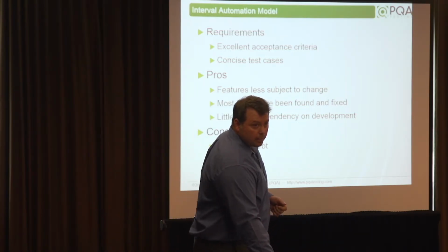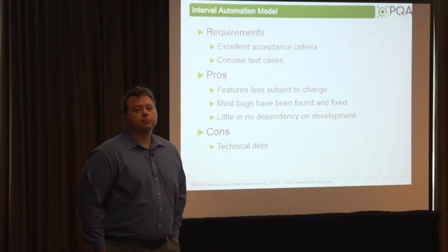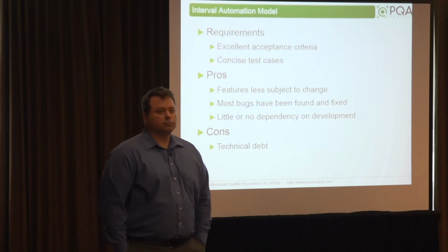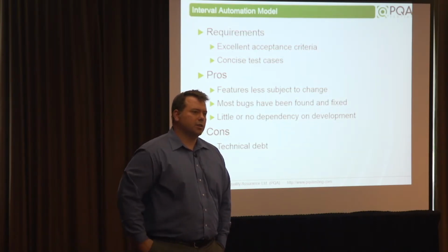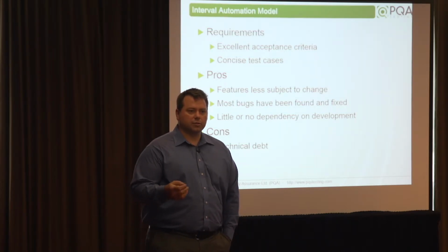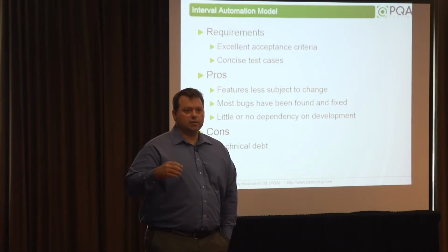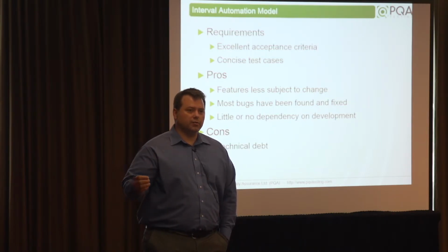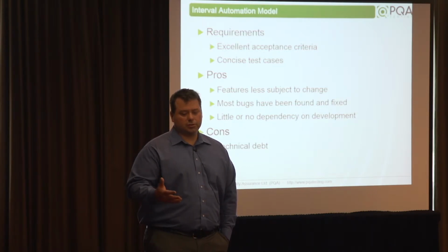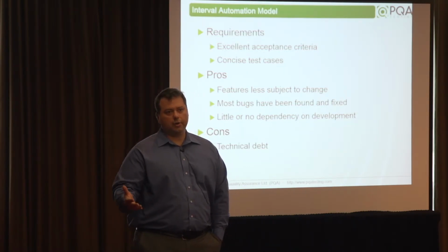Question on the last slide. Can you elaborate a little bit on what an automation story is? Yeah, I guess it's a story that talks about what you need to do to automate that feature. So taking a manual test case, looking at it, understanding what it means, and creating automation to fulfill that test case. Okay, so it has its own acceptance criteria. Yeah, I like to look at it as another story, the same as a development story, only it's for automating a test.